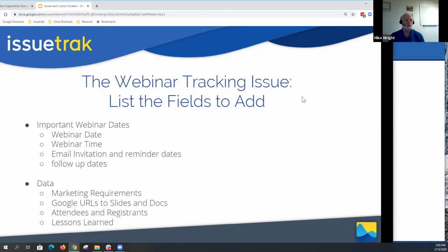We had data like marketing requirements. What was marketing going to have to do for me? How were they going to support my effort? How did I want to capture that data? The URLs for slides and documents, I wanted to be able to provide them. I wanted to know how many people actually registered and how many attended. And afterwards, I wanted to have a lessons learned item so that we can put in things that we did right and things that we did wrong. So the idea was to be able to use this not only to track the before actions, but the after actions of this particular webinar.